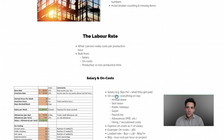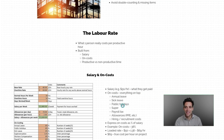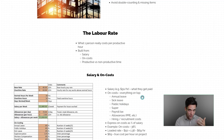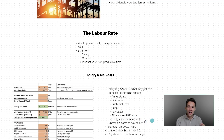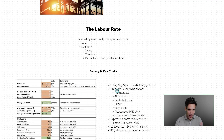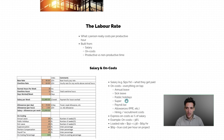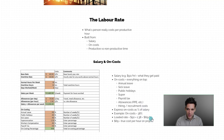The salary is what someone is paid for an hour that they're at work — if someone gets paid $50 an hour, their salary is $50 an hour. But what they cost the business is different, because on top of that salary we have to factor in annually: sick leave, public holidays, superannuation, payroll tax, allowances like PPE, consumables, as well as hiring and recruitment costs. What this means is while someone gets paid $50 an hour, what they really end up charging the business is probably more like 35 to 40% more than that.